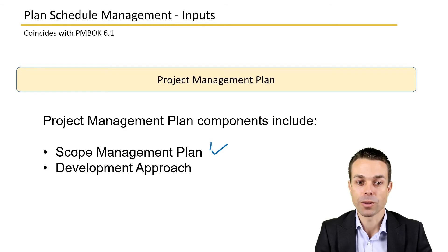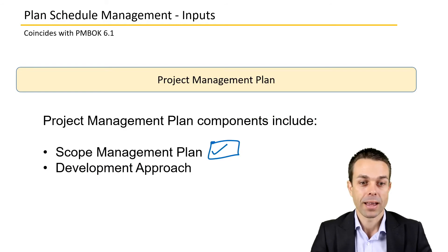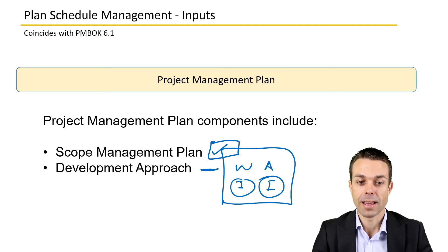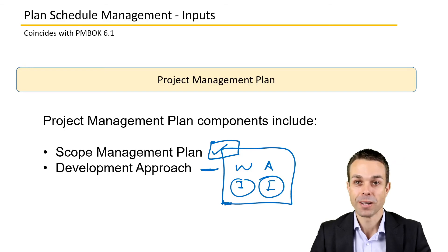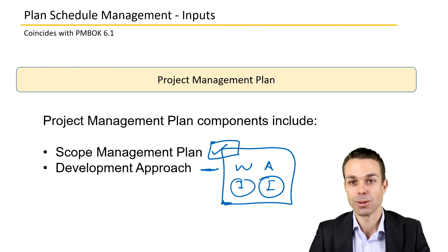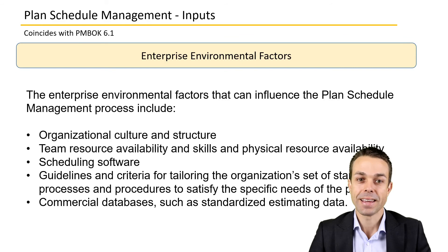The project management plan will also be an input — specifically the scope management plan with all of the scope we've gathered and the process used to gather it. The development approach matters too: is it waterfall, agile, incremental, or iterative? The details around the development approach affect how we define our schedule — is it done over time in iterations, or all in one big bang at the beginning?